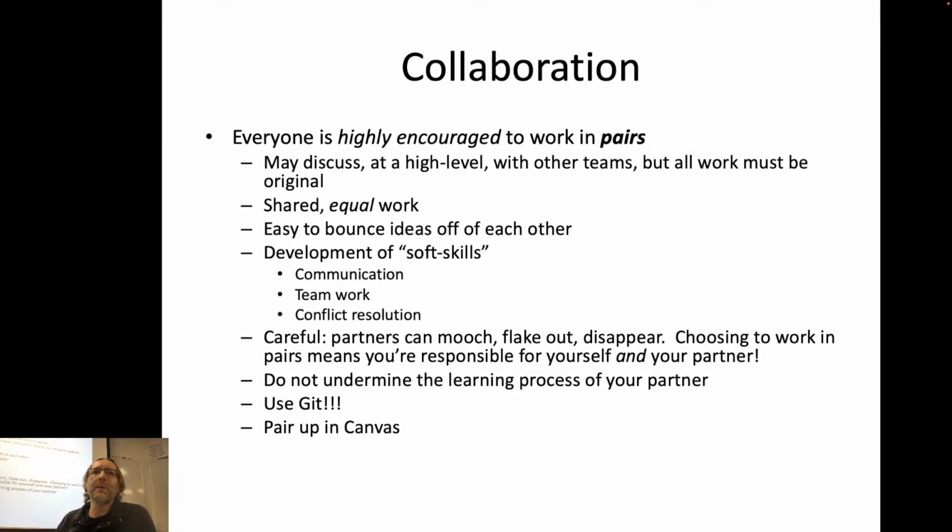There's a book called The Mythical Man Month, in which the idea is, okay, this software project is estimated to take 3 months with this team of 5 people. I'm going to go ahead and put a team of 10 people on it, and it's only going to take 1.5 months. Nope, it ends up taking 6 months. Why? Because the number of interactions, right, the number of conflicts, the amount of communication goes up by order of, not an order of magnitude, but order n squared, right? So more people does not necessarily mean better results.